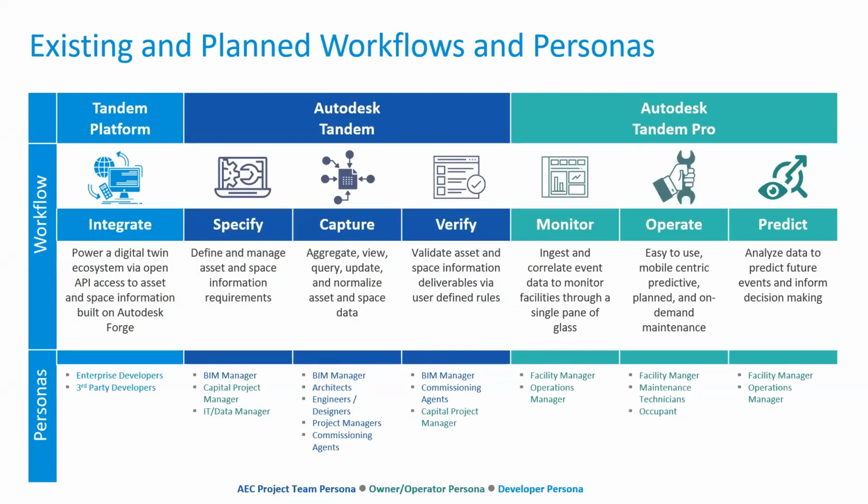Tandem, we really think about it in these buckets. We have an offering called Autodesk Tandem, which is in market today, focused on digital handover, that ability to specify all of your asset and space information requirements, with tools integrated with our portfolio to help you aggregate, view, query, update, and normalize all that asset and space data, and then tools to verify those outcomes to ensure you have a complete descriptive twin and be able to hand that over to an owner, including dashboards to report on where you are in the process.